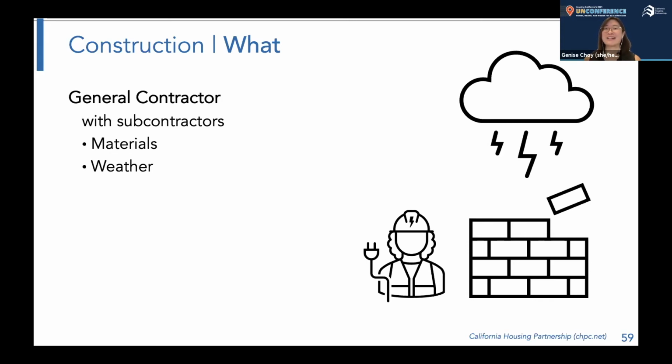And then schedule generally is a problem. There are lots of things that can affect schedule, including coordinating the schedules of other players. For example, there's one project that I know of that's under construction right now that's doing modular construction. And the contractor that's doing the modular units changed their schedule last minute. The GC had already engaged a crane to be on site to set the modules and couldn't change the dates. And that crane costs $30,000 every day that those modules don't show up. So the schedule can have a real impact on finances.